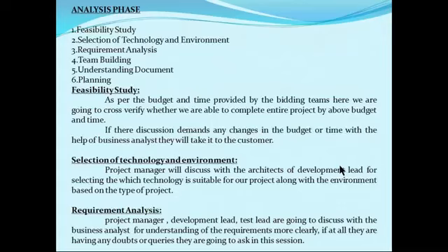Here during the analysis phase, first they have to go for feasibility study, selection of technology and environment, requirement analysis, team building, understanding document, and also planning. What is feasibility study? As per the budget and time provided by the bidding team, here we are going to cross verify whether we are able to complete the entire project within the above budget and time or not. Feasibility means which is possible, which is not possible.